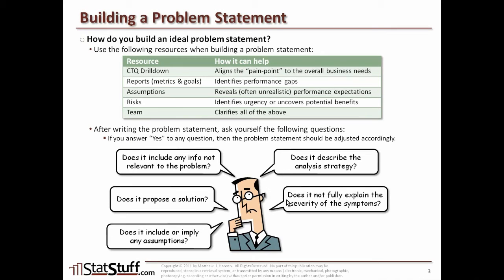Does it not fully explain the severity of the symptoms? If it does not fully explain the severity, then go back and use some other measurements or ways to explain why this is such a severe issue, why it's so important. That really should be included within the problem statement. Finally, you might want to ask yourself: does it presume what the root cause is? If it does, get it out of there. Let the project, as it progresses through the DMAIC methodology, let that root cause naturally be identified using the data — not just some assumptions embedded within the problem statement.